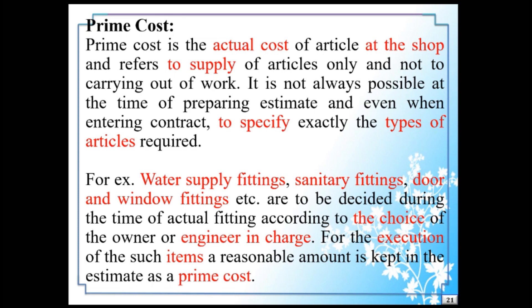For example, water supply fittings, sanitary fittings, door and window fittings, etc. are to be decided during the time of actual fitting according to the choice of the owner or engineer in charge. For the execution of such items, a reasonable amount is kept in the estimate as a prime cost.